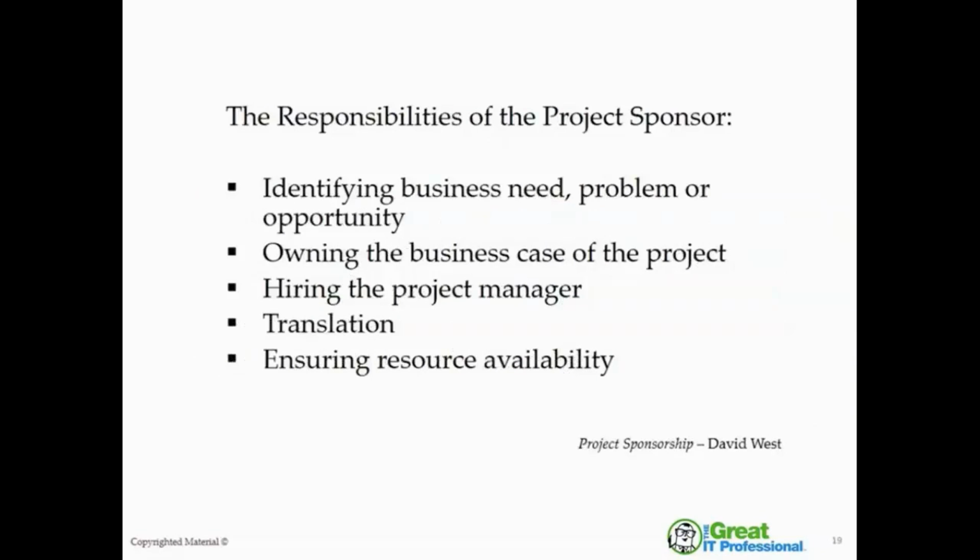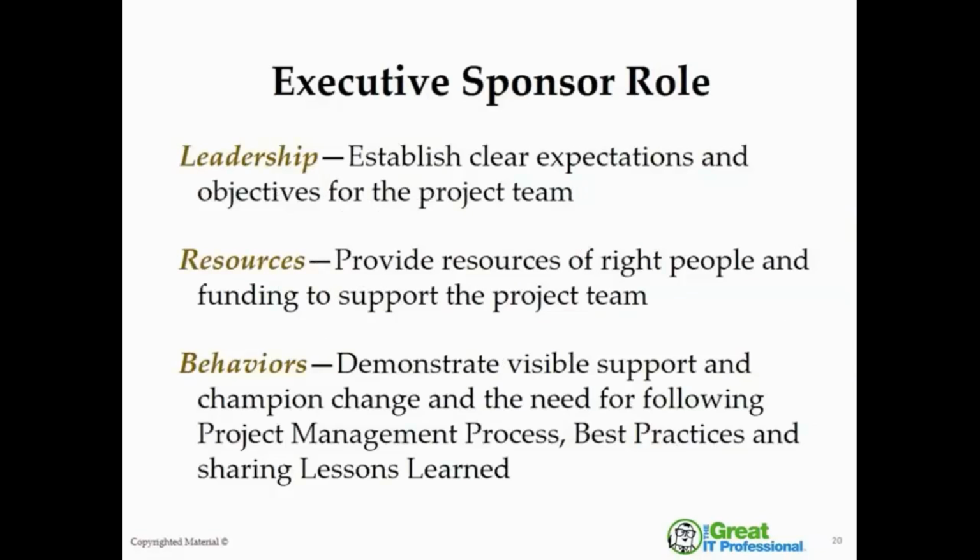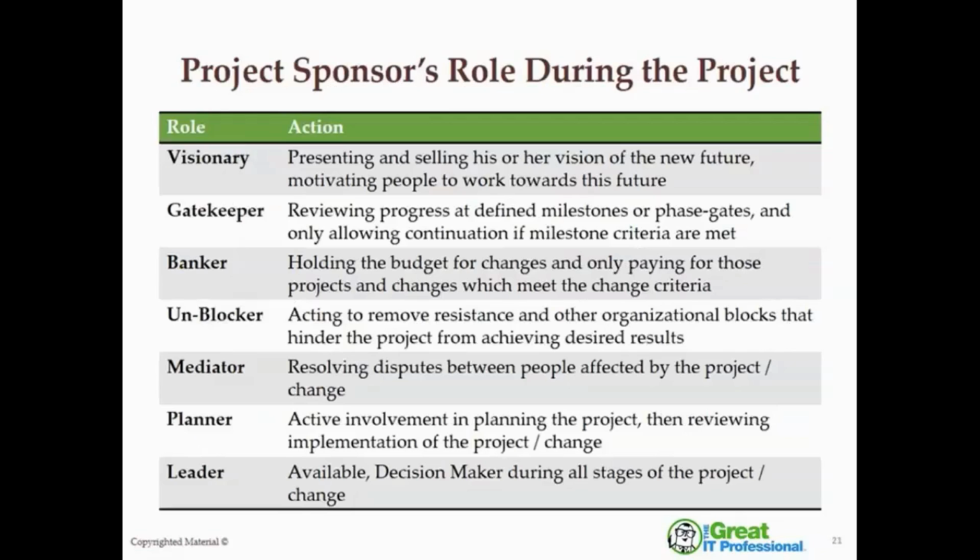Now, just to highlight some of the responsibilities: identify the business need, own the business case, hire the project manager, which I call a project leader. We'll talk about that in a second. Translation, and I'll explain that also in a little bit, and then ensuring that resources are available. It's a leadership role. It's responsible for ensuring that the resources needed for the project are available and provided, and for demonstrating visible support not only to the project team, but to the sponsor's peers, the other executives in the organization. And here's a little bit more detail.